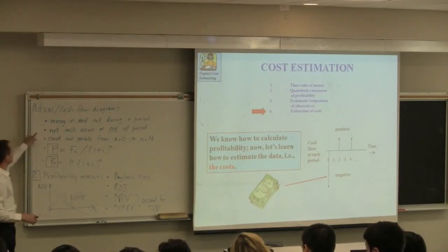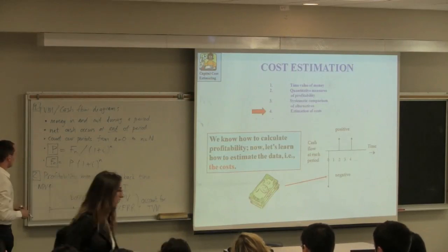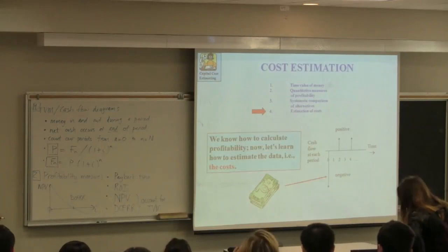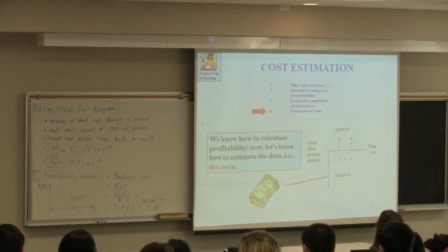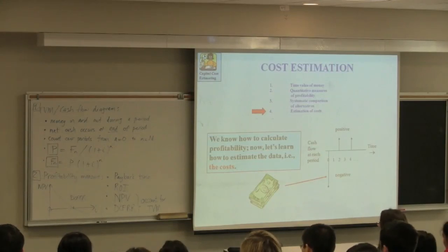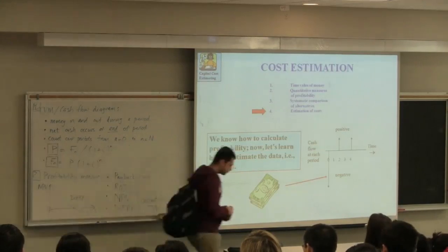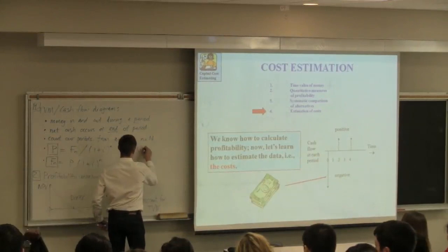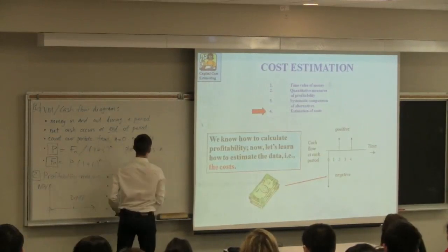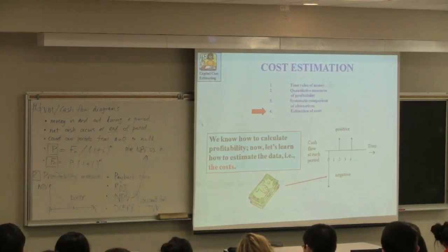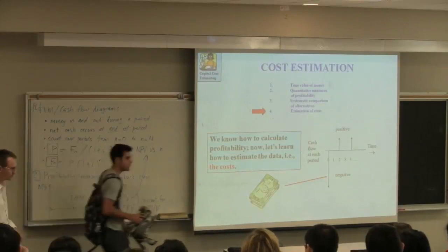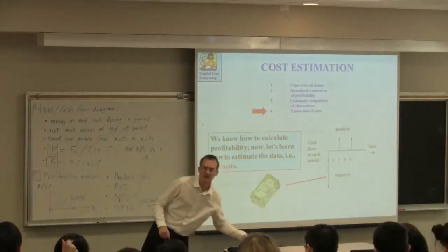Once we have our cash flows, plot those cash flows in NPV terms against time, against every period n: 0, 1, 2, 3. That gives you a great idea of how the profitability of the project is changing. It also indicates very clearly when your project will break even, so you will get a measure of payback time from that graph as well. Let's emphasize one important thing to plot: NPV versus n, your lowercase n, the period. Plotting the period zero value, then period 1, 2, 3, 4, whatever.